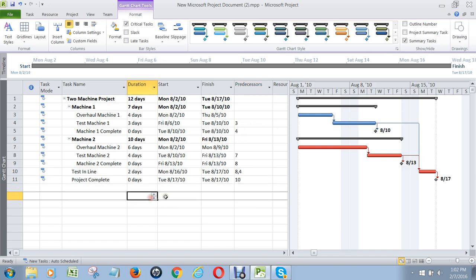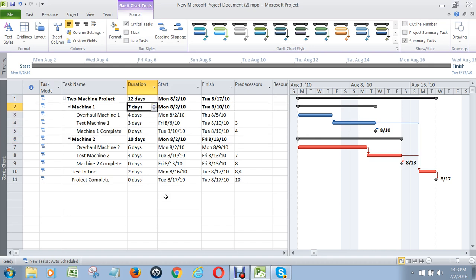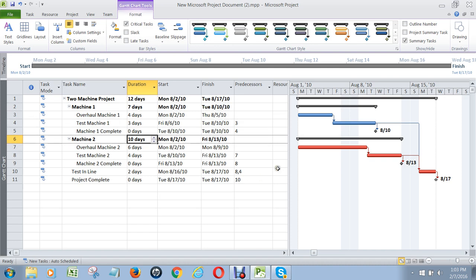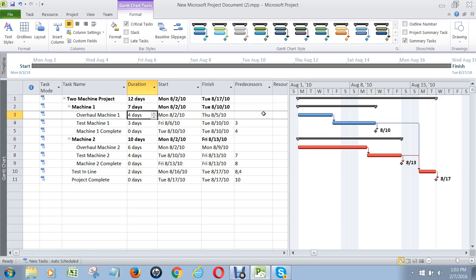The other bit of confusion people have is why the project summary is only 12 days long. When you add up machine 1 at seven days and machine 2 at ten days, that should mean 17 days, right? Well, no, it doesn't — because machine 1's work overlaps with machine 2's work. While machine 2 is being worked on, machine 1 is also being worked on. So this figure here is the total project duration, not the sum of all the durations of the summary tasks or the tasks under it.